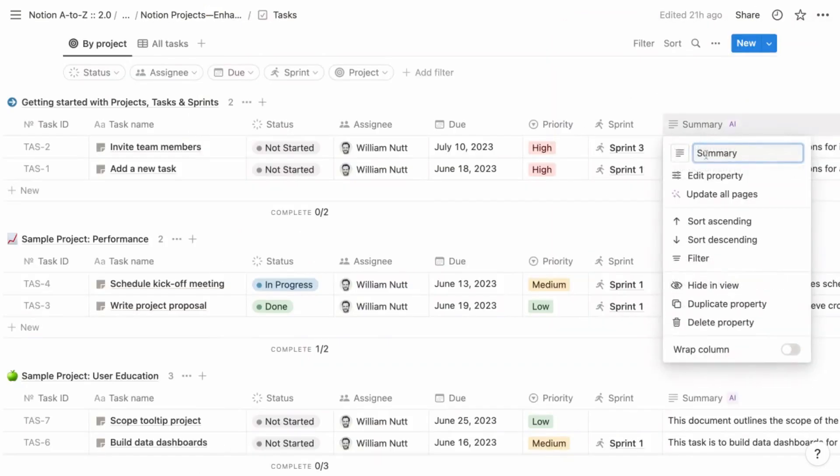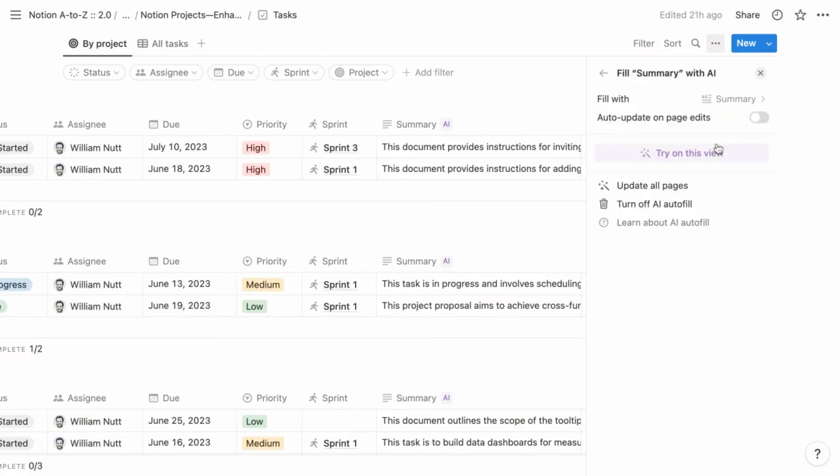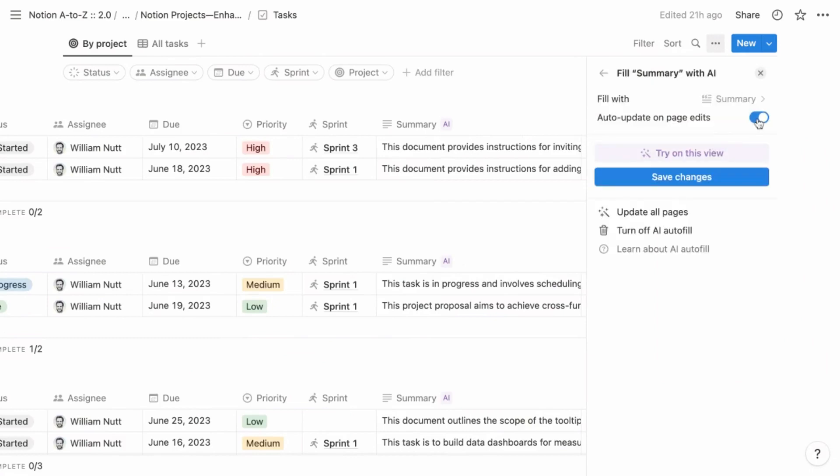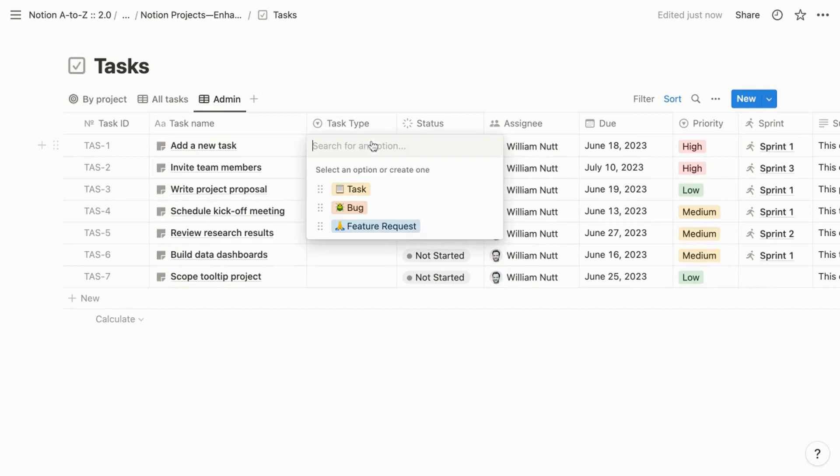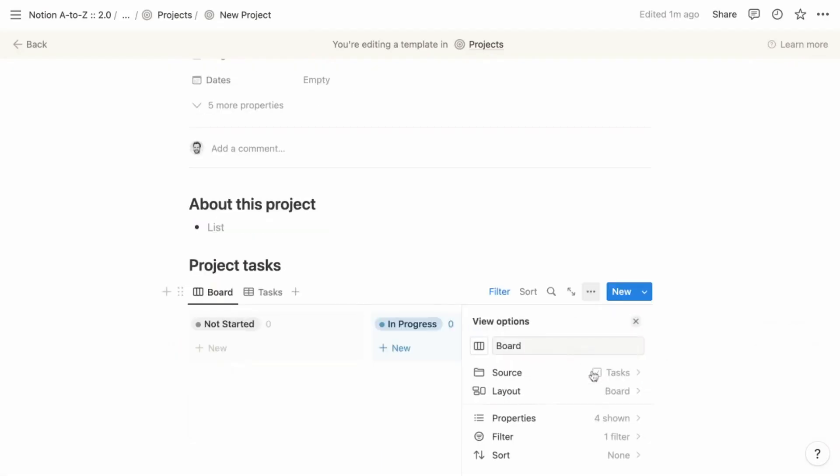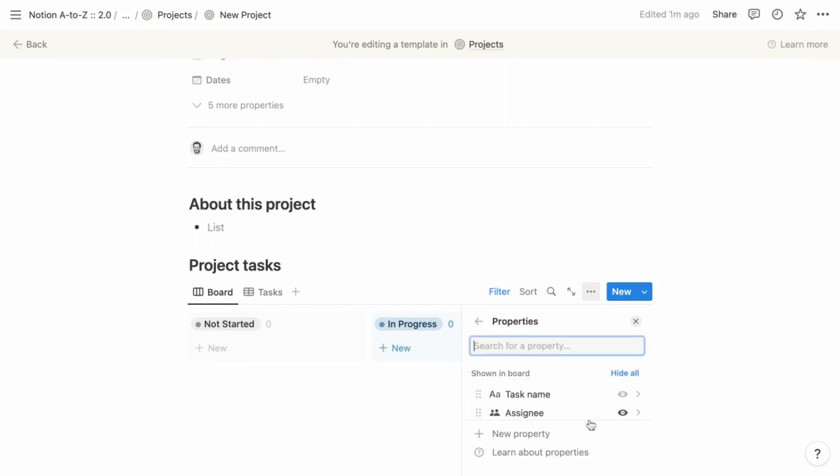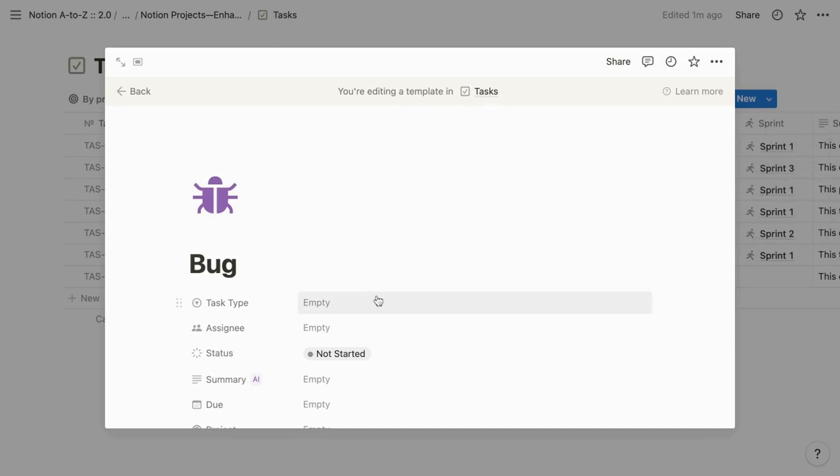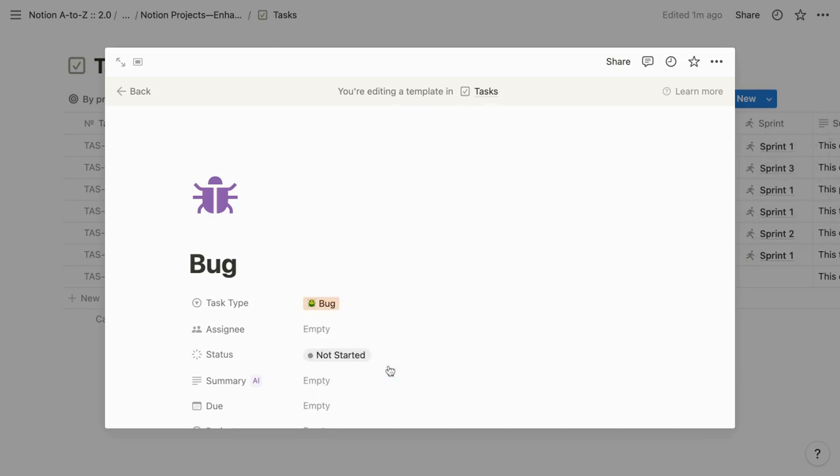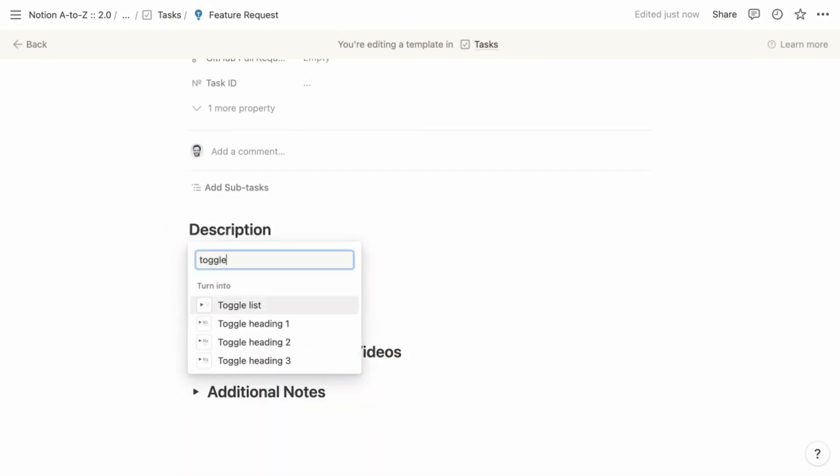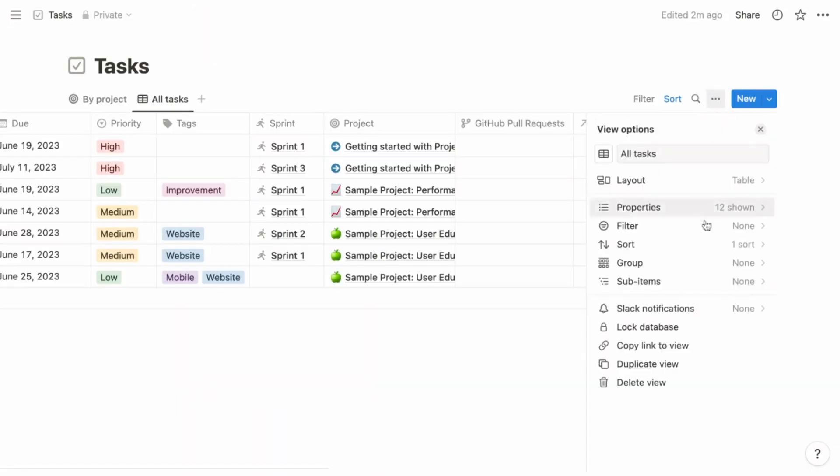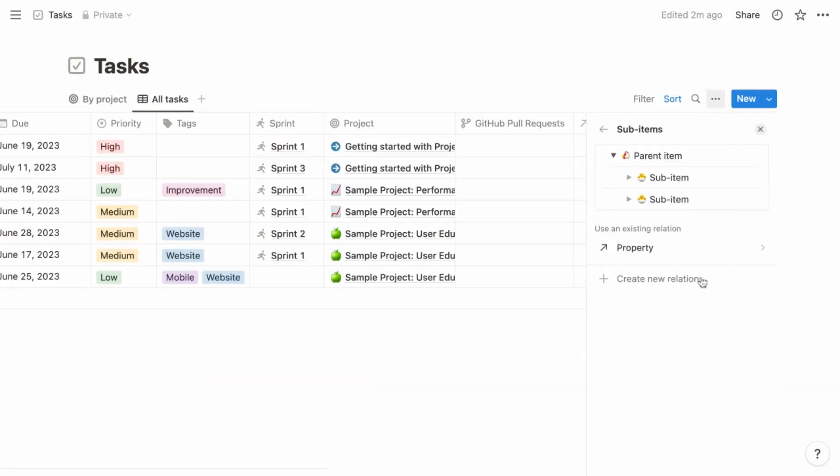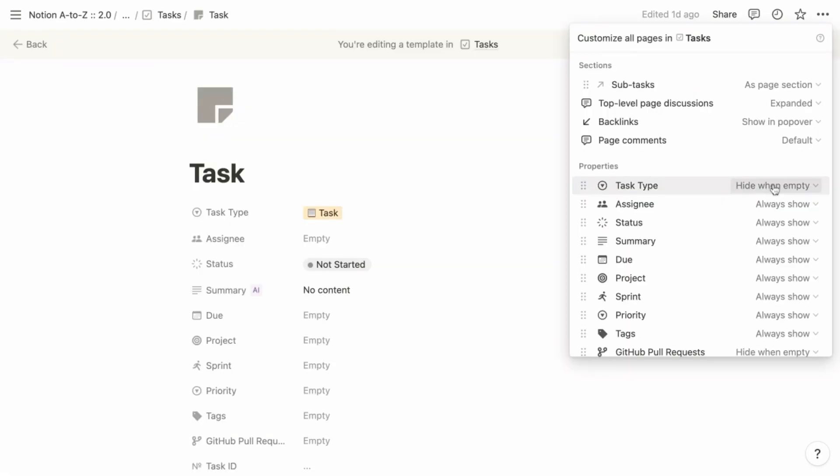In the tasks database, enable auto-update for the AI-generated summary property, and then add a property called task type, where you can choose task, bug, or feature request. For all views across the system that display tasks as cards, show that task type property, and then update each task template to populate its task type automatically. Within those task templates, convert the headings to toggle headings. For all table views within the tasks database and the sprint board page, enable sub-items.